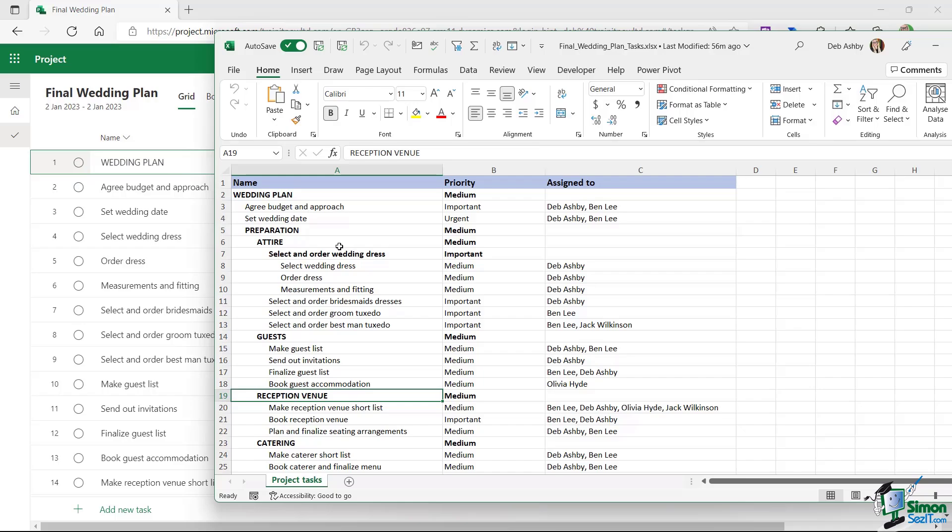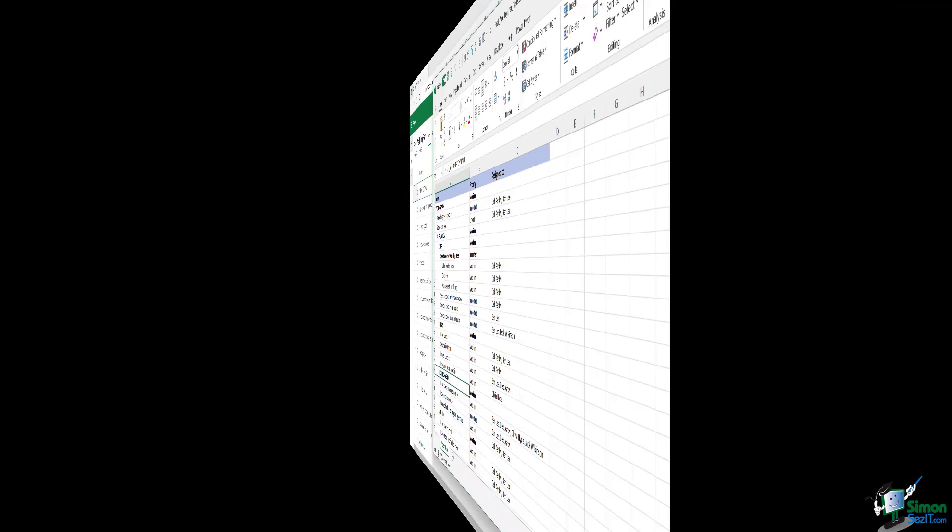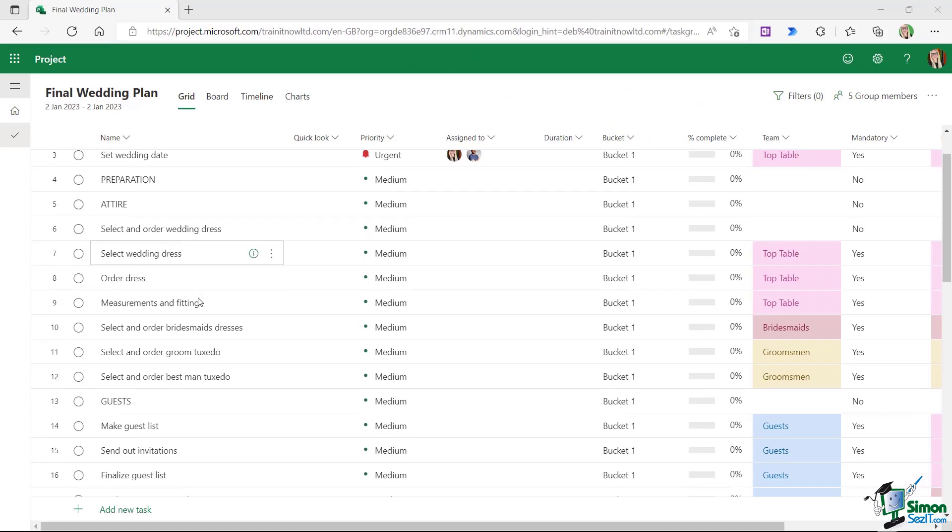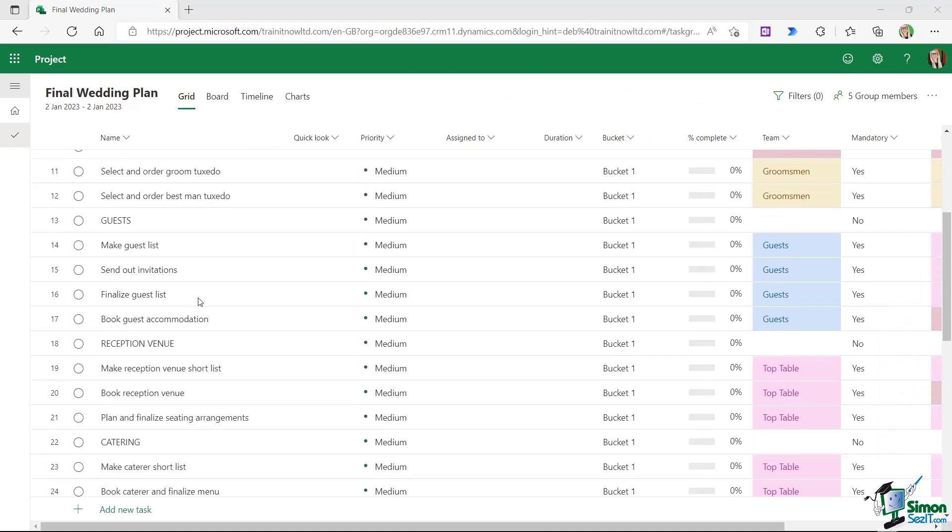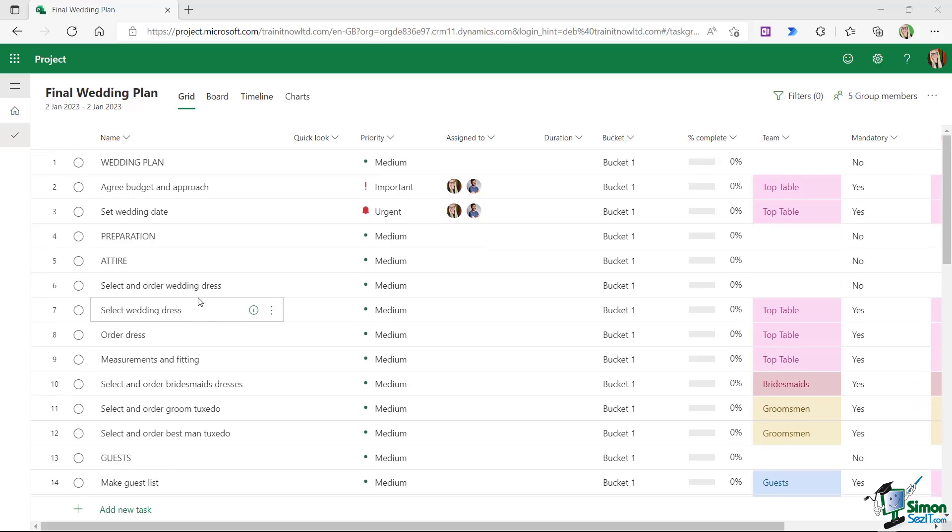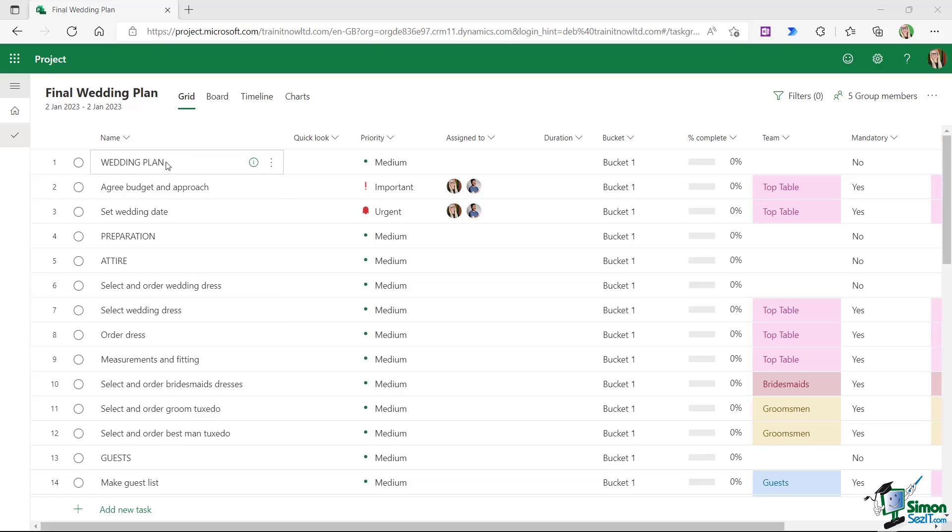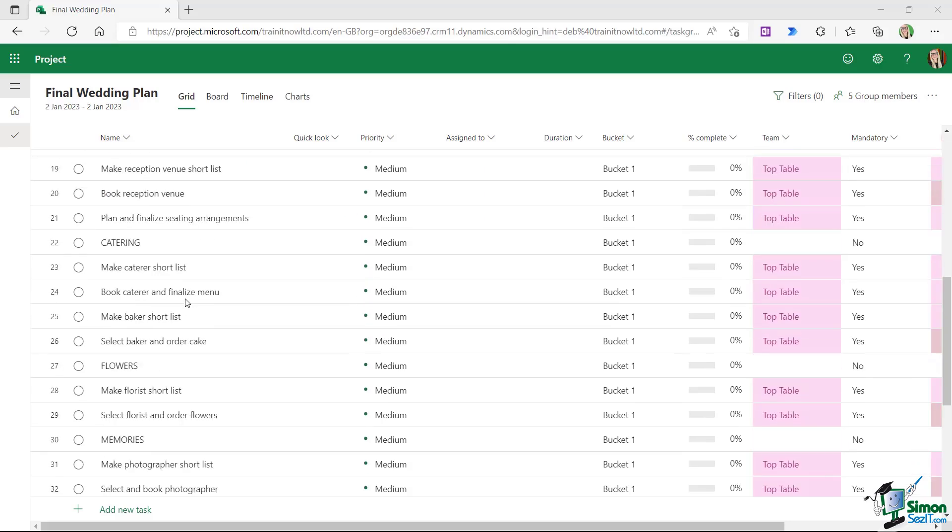So now I've added in all of those summary tasks and moved them into the correct positions within the project plan. But they still don't really stand out very much, and currently these are still all individual tasks. We don't have any tasks that are subtasks of other tasks. Now where we have wedding plan at the top, this is something I like to add in which gives me an overview of the entire task list. So effectively what I want to do here is I want to make wedding plan what we call a summary task, a top-level task, and every other task in this project plan is going to be a subtask of that.